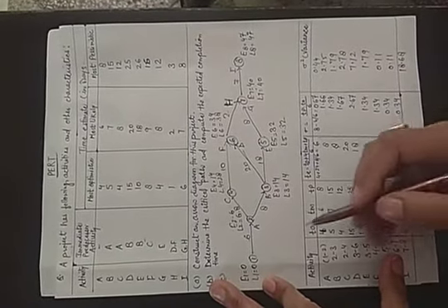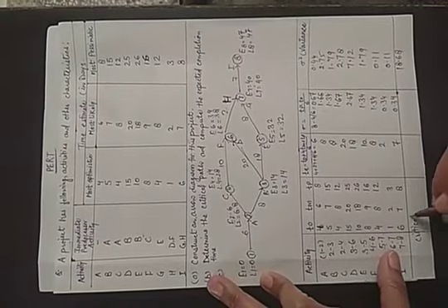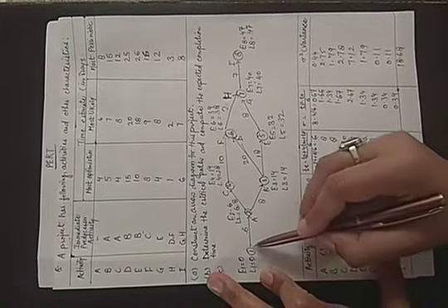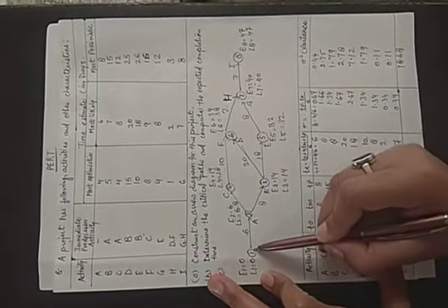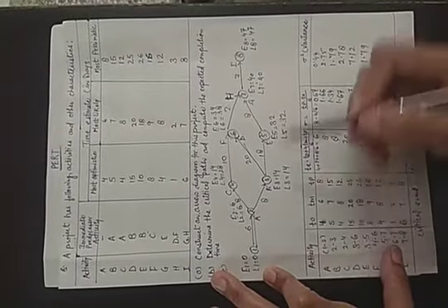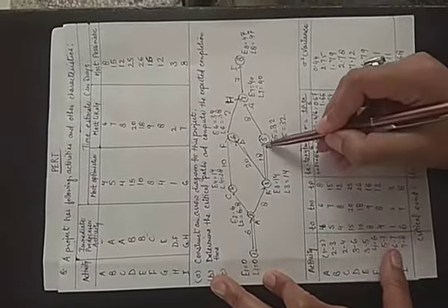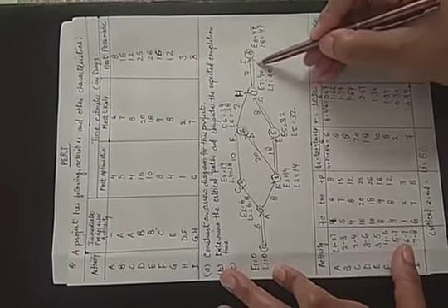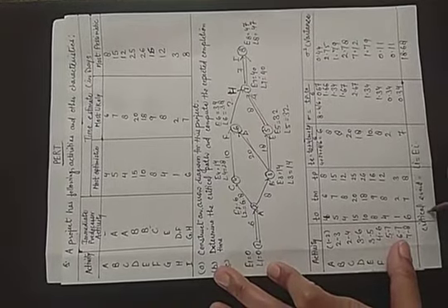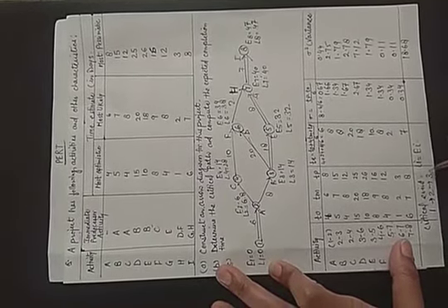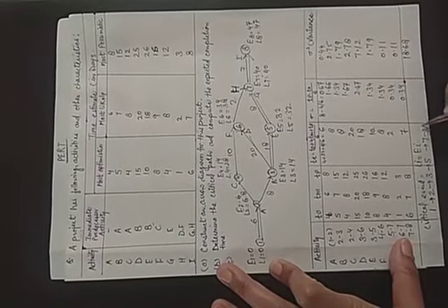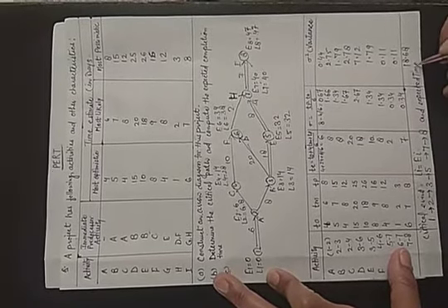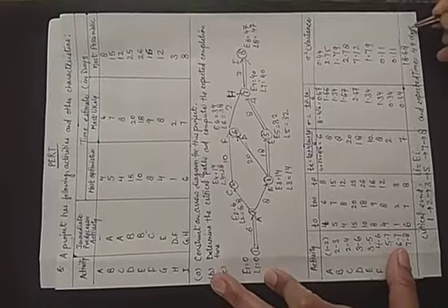Now the critical activity, what is the critical path? Critical events are where Li is equal to Ei. So E1 is equal to L1, E3 is equal to L3. We will represent it by the double arrow. Next is E5, next E7 is L7 and E8 is L8. So here the critical path is 1 to 2, 2 to 3, 3 to 5, 5 to 7 and 7 to 8. And the expected time in completing the project is equal to 47 days.